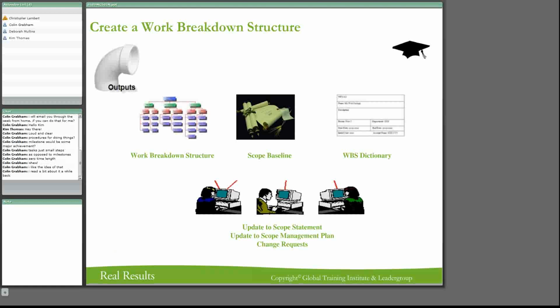If you've been keeping up to date with any of the project management things, you've probably heard about agile projects. And agile projects, one of the techniques that they actually use is this rolling wave. It reminds me of the last development that we actually did. We actually did it exactly like that. We planned very roughly the whole outline of what the development would be, and then we took a small part of it and we planned that in detail. So we prototyped the whole thing in general, and then we kept on doing an iterative process. And one of them, we had at least 3 iterations on them, and we got down to more and more detail in that.